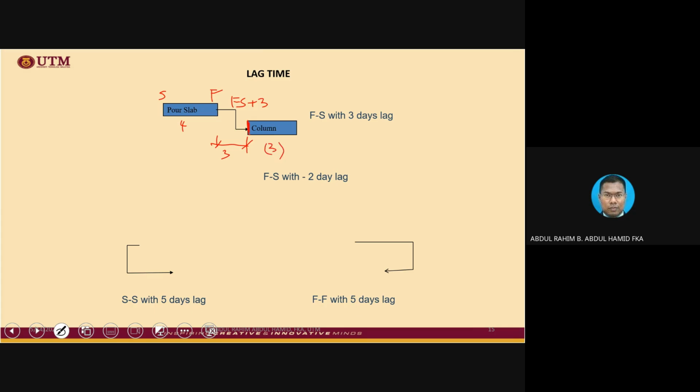When we do the calculation, of course, we are going to start with 0. 0 plus 4 equals 4. Okay. 4, we are going to add with these 3. Remember, the forward pass, this is the calculation from left to right. So 4 plus 3 equals 7.